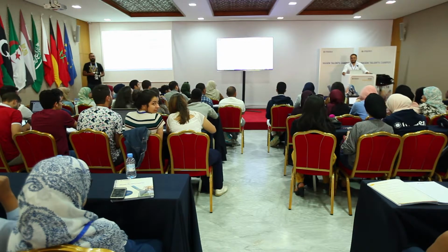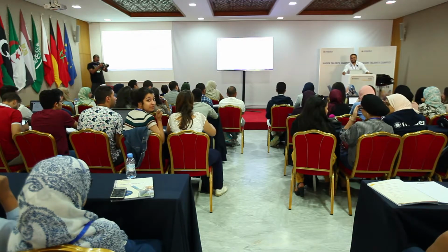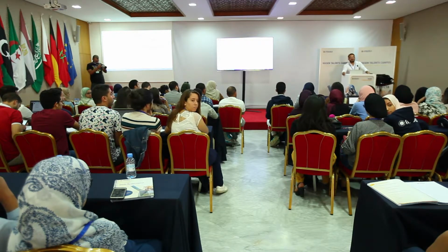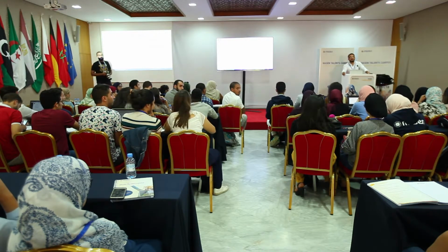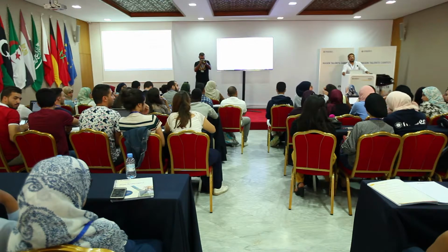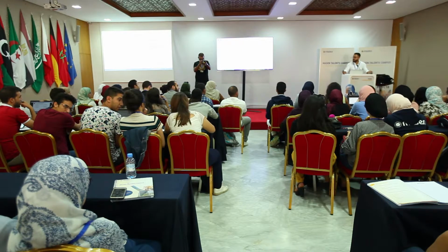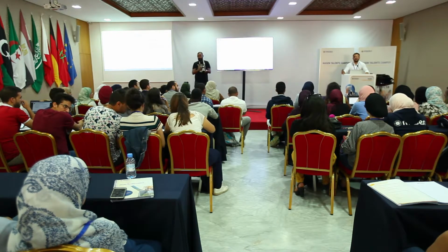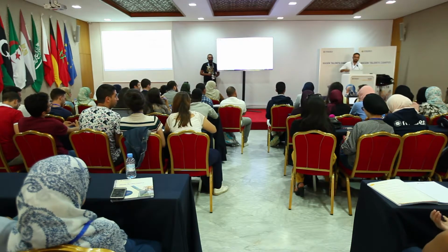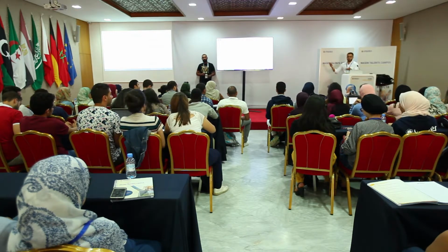Why did NUR 1 take more time for planning than NUR 2? Just what I just said. This is a matter of maturity and experience gained. I didn't get the reasons behind the different costs per megawatt. The reasons are a combination of maturity level. People now trust. The industry is more experienced. Masen is more experienced, and the banks also. In the very first projects, the banks needed to consider this as a more risky project. When you consider something more risky, basically what you demand is a higher interest on your loan. Nowadays, they see it as less and less risky. So of course, the combination of all of this, experience gained from all the different actors, brings down the cost.